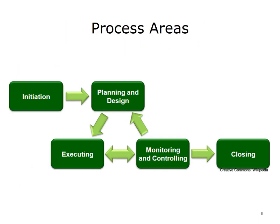The five process stages of project management include the following: initiation, planning, implementation, monitoring and controlling, and closing. The initiation stage covers all the processes that define the project's scope, objectives, and environment. Once the manager develops a comprehensive grasp of these details, he or she can begin the planning stage. This stage focuses on developing a schedule and budget, identifying necessary staff, resources, and supplies, and preparing for potential risks. All of this work is captured in the project plan.